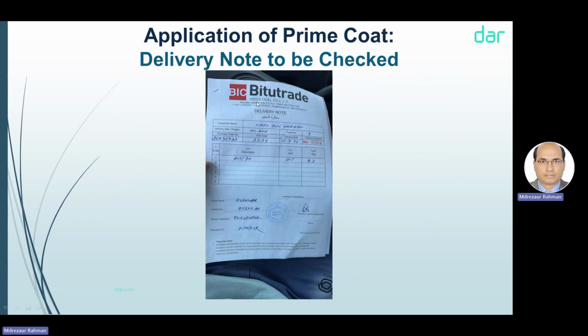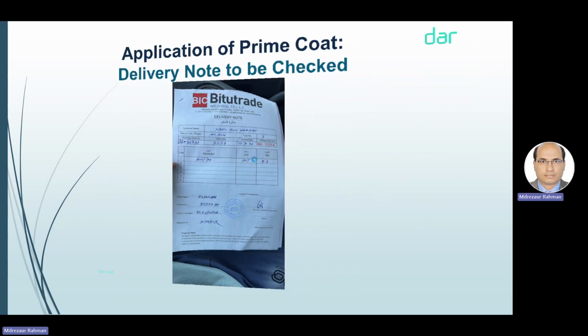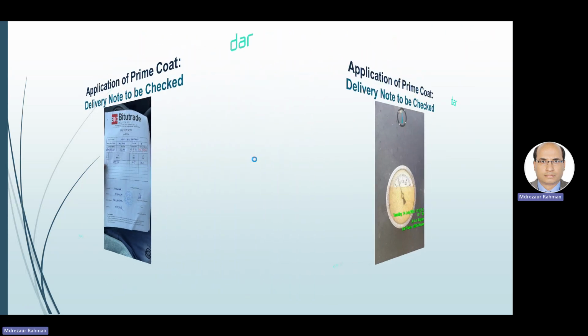Is this supplier approved? Yeah. B2 thread. Everybody should have the top sheet approval copy of material approval. Everybody should have it. That's good. And when material is delivered, we have to check whether the supplier is approved or not, and whether the material is MC70 or not. Otherwise, we cannot allow them to proceed.